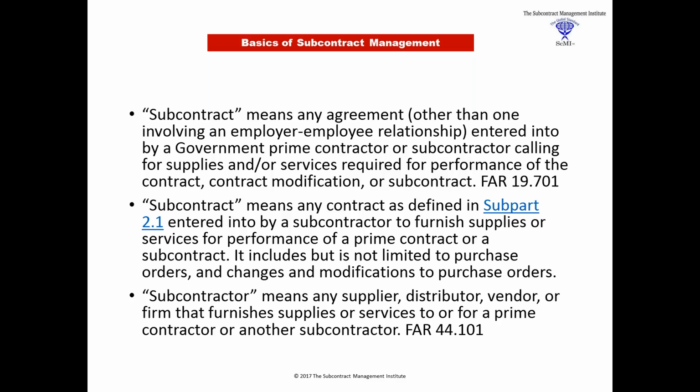We also see that subcontract means any contract that is defined in subpart 2.1, and that's where contract is defined. And it's entered into by a subcontractor to furnish supplies or services again. But it includes, even though it's not limited to, purchase orders and changes and mods to purchase orders. In other words, the size or document behind the agreement really isn't important. It is still a subcontract and falls under these rules.